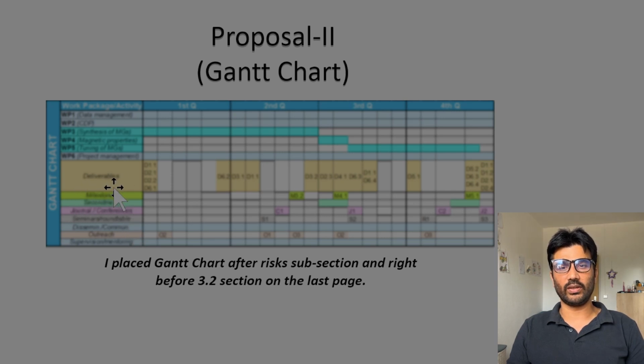For these deliverables, you can mention which month you will achieve them. This should be linked with the work packages table that you give here. You can mention which ones you will achieve, because if you write too many deliverables, there might not be enough space. Although they still look like a lot, you should be careful while promising your deliverables in the work packages, because you have to mention them here.